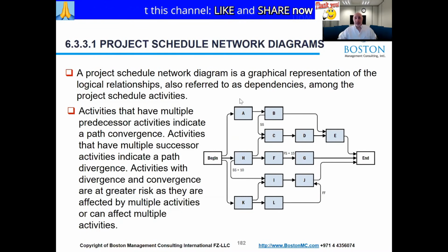The only thing that prevents this from being called a schedule is that it doesn't have the dates on it. You notice all the boxes look the same, back to back or sequenced in a certain way. That's what they expect to have happened at this point. All the boxes are ready with the right relationship, and you would have completed the sequencing.